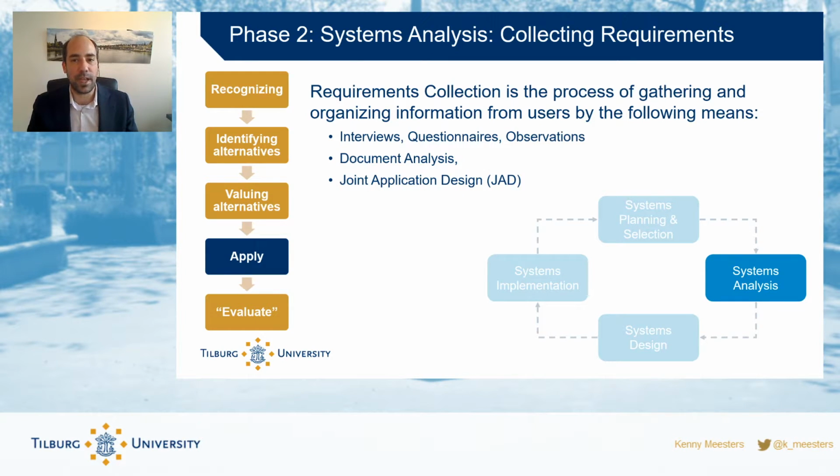And there's different ways of gathering these requirements, and requirements engineering is a whole field of study in itself. So we're going to briefly touch about it here. But you can collect that information from interviews, by talking to people. You can conduct surveys. You can observe how people are using the current software, for example. But you could also look at documents, business process manuals. You can look at reports that have been produced, previous projects that have been conducted. But those two, interviews, questionnaires, document analysis, that's very passively obtaining information.